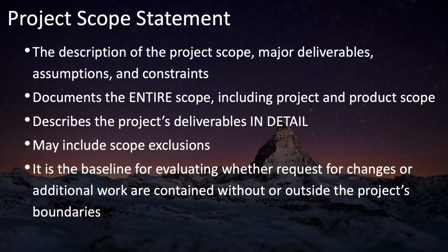It may also list specific exclusions of the scope, things that specifically will not be included in the project, just for clarity. And it's the baseline for evaluating whether a request for change or other additional work is contained within or outside the project's boundaries.